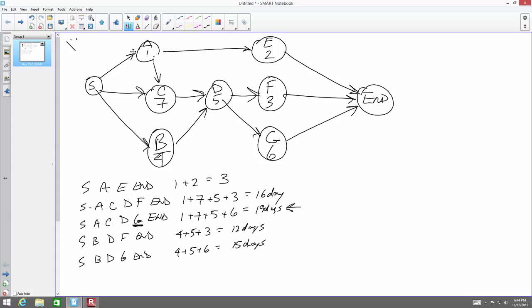Obtaining bid documents, that's definitely what you would be doing. You're getting those documents so you know what you've got to bid on, right? You would be securing subcontractor material quotations, because that's the only way you can bid jobs. How much is that aggregate going to cost? How much is that truck going to cost? How much is that labor going to cost? So you would be doing that. And you would be delivering a competitive or a negotiated proposal to get the work done.